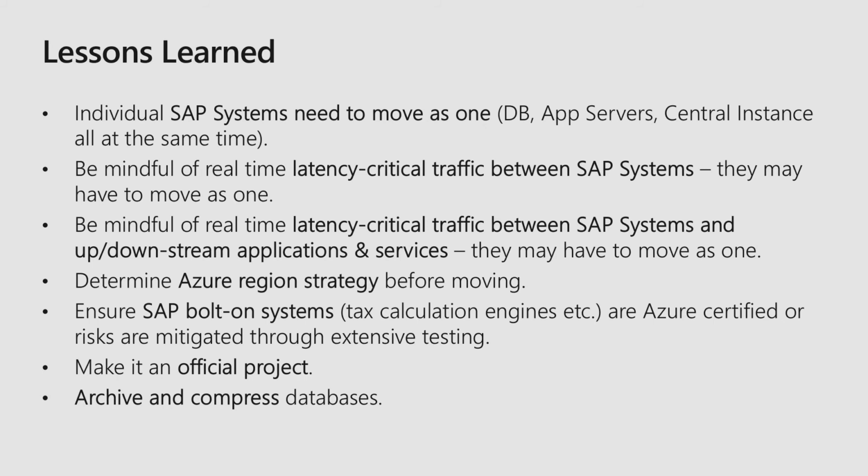And suddenly some performance issues popped up. Well, what happened? One of the legacy systems decided to use a different DR region than ours. Well, sorry, we told you we're going to move to US East. So why didn't you go to that same location? So make sure you put that region down solid and make sure that's a corporate kind of policy.